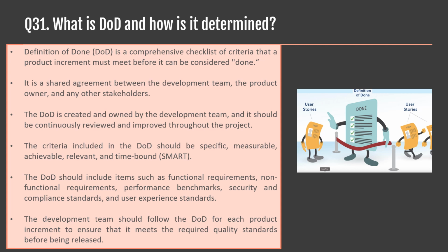The payment integration must meet all acceptance criteria defined in the product backlog item. Testing. The payment integration must pass all automated and manual tests. Code review. The payment integration must pass a code review by at least 2 members of the Scrum team. Documentation.